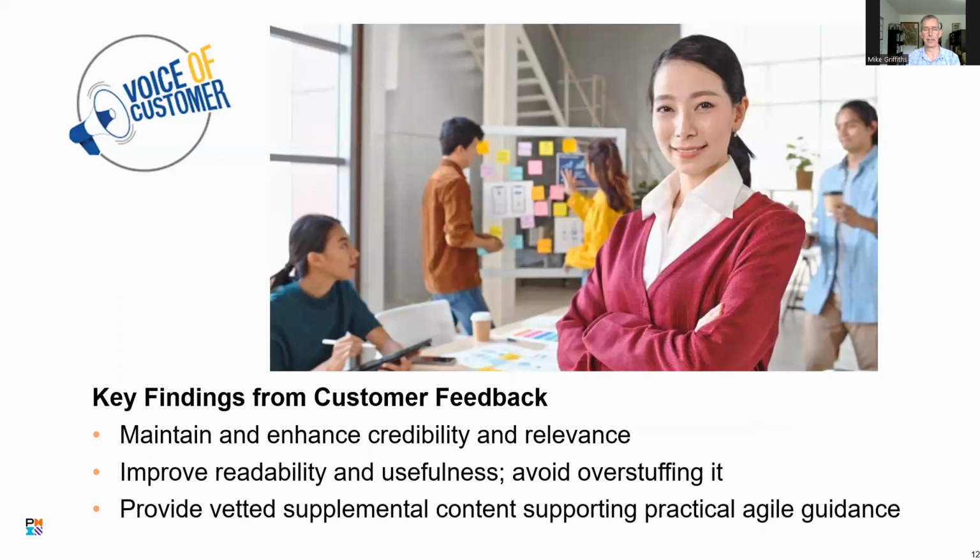We don't want, and this is where it's difficult, a lot of people in the tech space are probably not using work breakdown structures and earned value to track their projects, because they change very quickly in terms of requirements and technical uncertainty and what the customer is asking for. And some of those tools kind of rely on a baseline original plan, which is very hard to create when we have high rates of change. But if you're in the construction industry, then absolutely these things are critical.